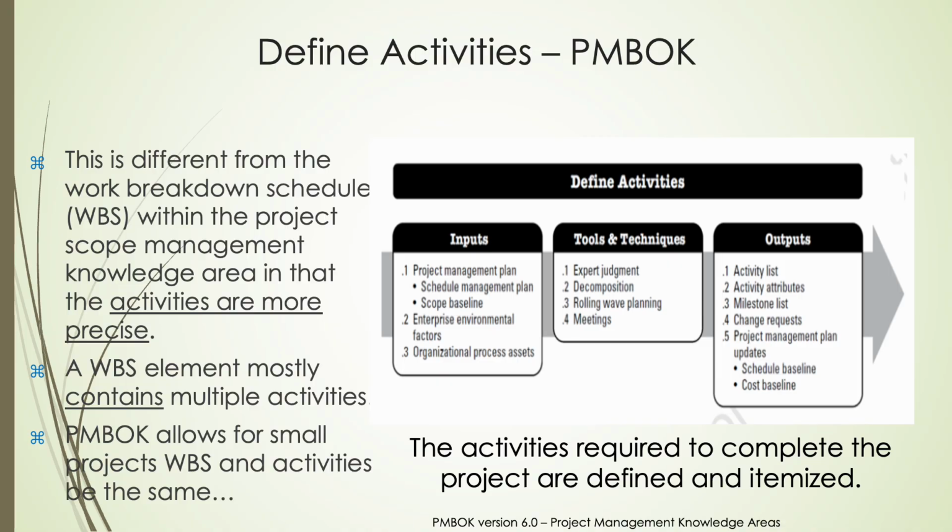While the WBS organizes the project's work into major deliverables, defining activities drills down further to outline the exact steps needed to complete those deliverables. Typically, one WBS element will include multiple activities, offering greater detail necessary for scheduling, budgeting, and tracking progress.